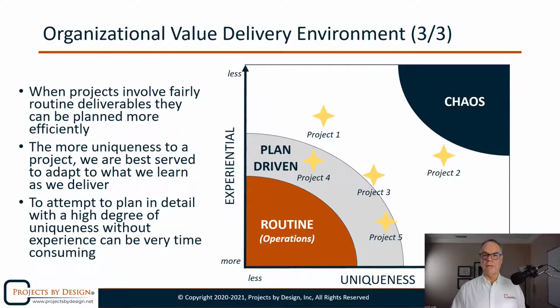A plan-driven approach means we're going to state with a high degree of certainty at the very beginning what we're going to do, what is going to happen, when it's going to happen, and how much it's going to cost. For all those other areas where project deliverables aren't routine, and we're going to have to learn as we go, we're going to take an adaptive approach.